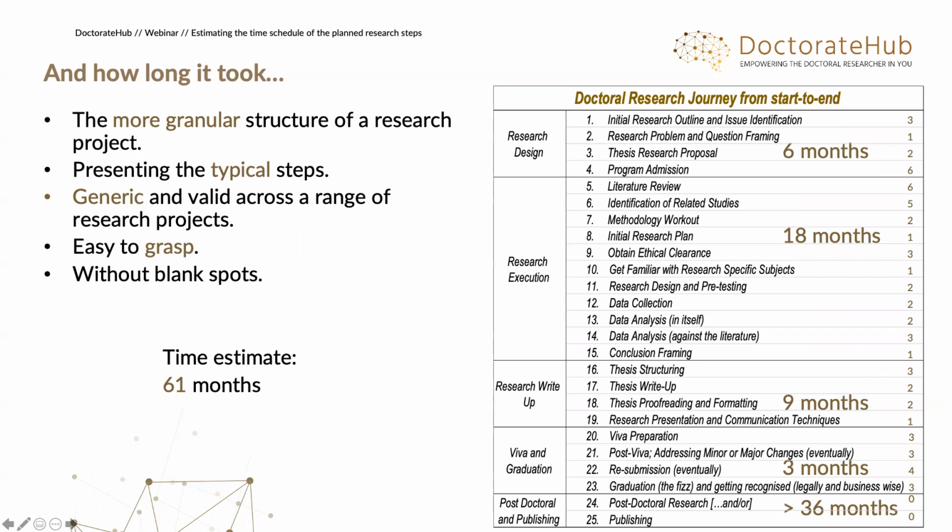Second of all, this might mean you will run out of funding at one point in time. If you are on a fully funded doctoral journey, then what happens after year 3 or 4 once the funding dries up? So this is something that you might want to anticipate already, to factor that in. Or if you are self-funded, then you also planned for the research to be done in 4 years. Therefore, your savings have been allocated in accordance with that. Now, you might want to reconsider that and have a more conservative planning of your research project.